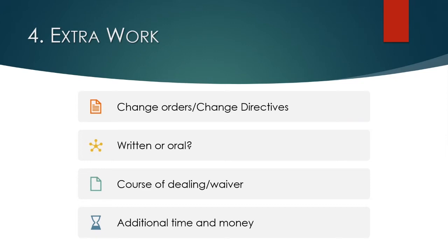Many contracts that we review have a provision that the change order extra work has to be in writing, signed by at least one of the parties, typically by both parties as it comes to a change order. But does that mean that the parties can alter that course of performance, that course of dealing, such that change order work is not being memorialized and signed? And the answer to that is yes. And so you want to make sure that you don't fall into that trap where, notwithstanding what the contracts say, the parties are operating under something quite different.